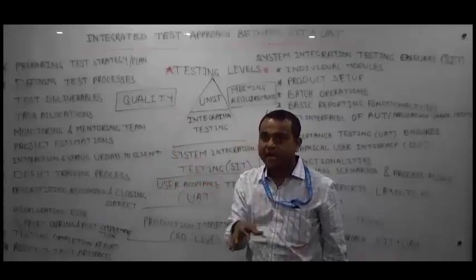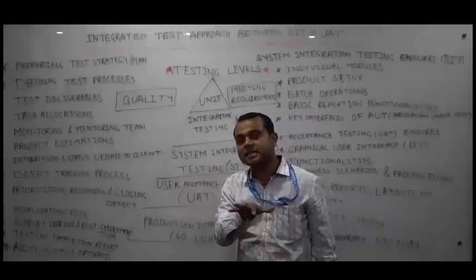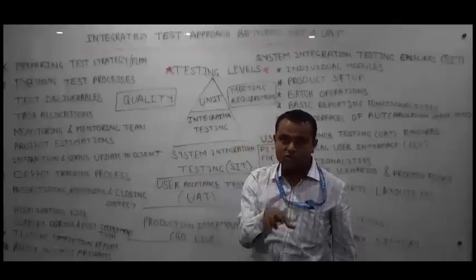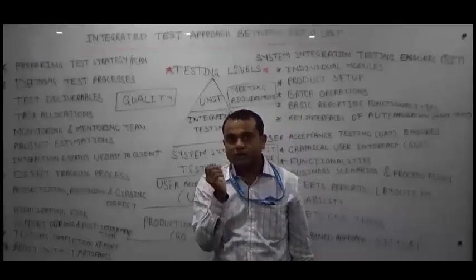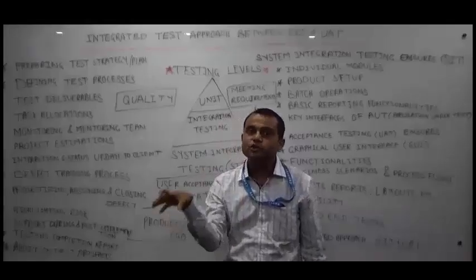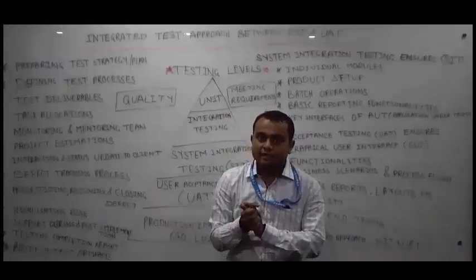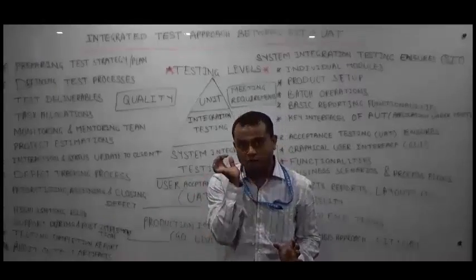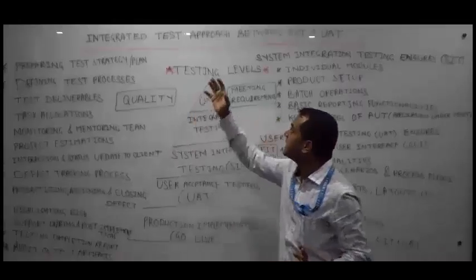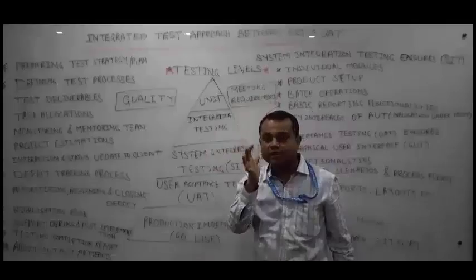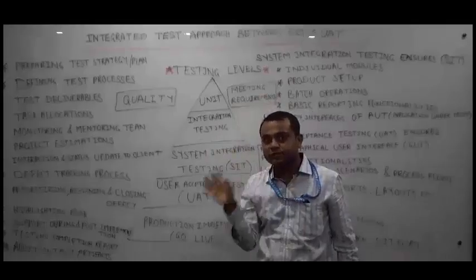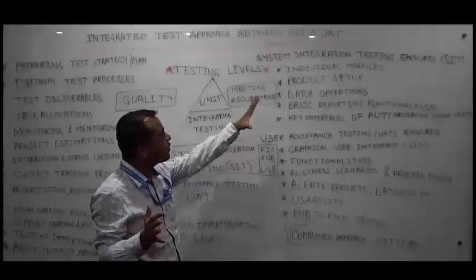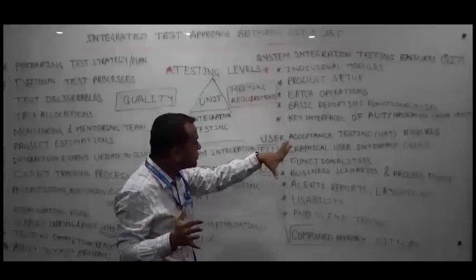Generally, what happens is that after the sign-off from the SIT stage, UAT starts. But based on time and cost, it is not required that SIT should provide sign-off and only then UAT should start. SIT and UAT can happen in parallel. So no entry control document is required for UAT to start testing because it is an integrated test approach, and the effort to prepare the entry control document will be minimized. After that, what do we mean by SIT and what do we mean by UAT? What things do we perform in system integration testing and in user acceptance testing?